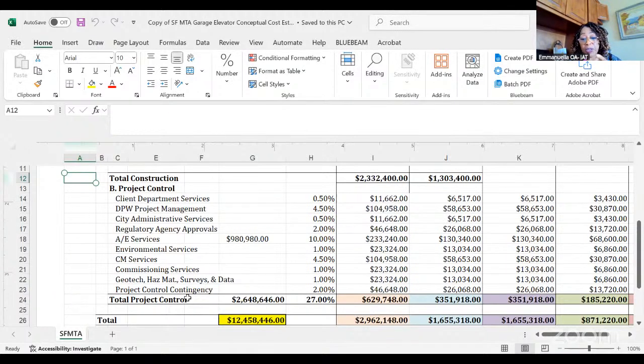In construction, we use percentages. We have the hard cost and the soft cost. So it's important for you to understand and identify all the different groups or expenses that you have to pay. And remember, this is a projection. You start off with an estimate, and then as you go through the process, it becomes more definite. But your 5 million naira that you got, you have to subdivide it into where it needs to go.